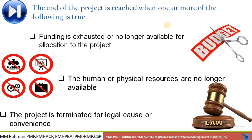The project can also end when funding is no longer available — without money you cannot run a project. Similarly, if human resources or physical resources are no longer available, the project is finished. Finally, a project can be terminated for legal reasons. For example, if the government circulates a new law that is not compliant with the output of your project, you must terminate that project.